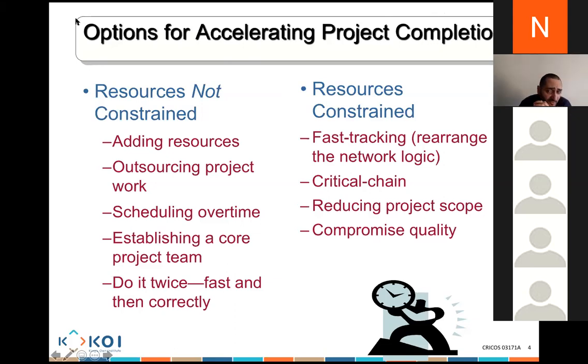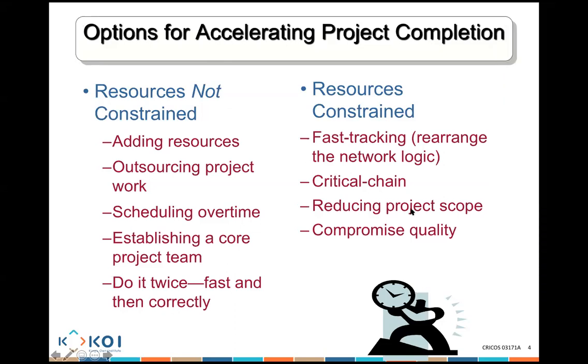Yes, sir. The simplest way for me to tell you, the critical chain looks at the resources that are available for you. If you don't have enough resources, the critical chain will look at the critical path and say, we need to increase the duration of the activities. We can't meet the deadlines that are expected. And they will find a lot of merge activities and they will say, let's go and add extra time to those merge activities, which means it's going to further increase how long the project is going to be taking. Does that make sense? Okay, sir. Thank you. Do you understand? Yes, sir. Perfect. All right.